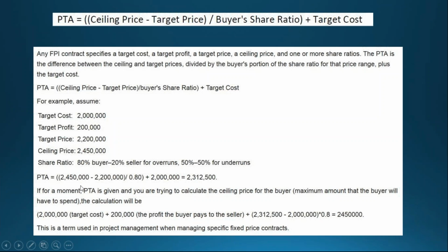And I want to point out back to target price that this is an important line for both of us. So I want you to see that as almost the equilibrium line here. Target price is important to us, the customer, because we want to get it for the best price, and this is the best price. It's cost plus a 10% profit margin. We're not going to get any cheaper than that. From the vendor's eyes, that's all he's getting. He's going to get his cost and his 10%.